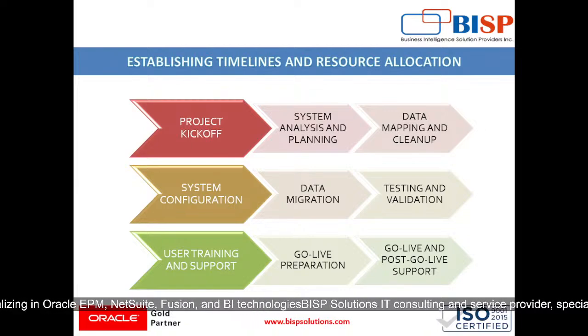Then testing and validation, which means conducting system testing for functionality and data integrity and performing user acceptance testing, which means UAT. And user training and support, which means training our users on NetSuite workflows, reports and dashboards and providing them user manuals and conducting Q&A sessions if there is any need. Then go live preparation, which means finalizing the cutoff date for QuickBooks operations and preparing a go live checklist, which means data validation will be done, system backups are taken, etc.